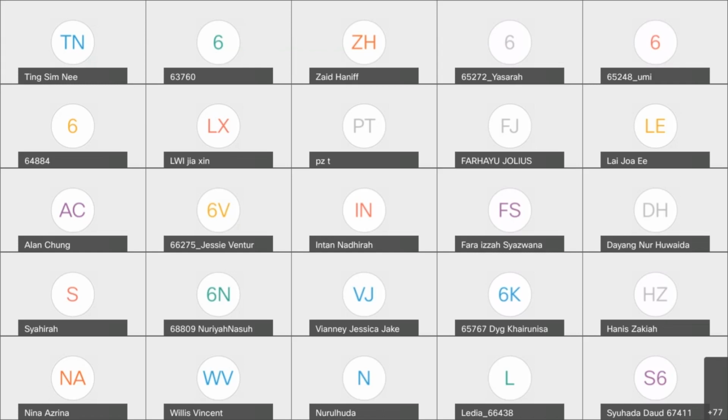If you pay the semi-skill $50 a day and the general workers $25 a day each, the combination of the team will be 50 plus 25, 25, 25. So you'll be looking at 125 per day as the cost for that particular team of workers.